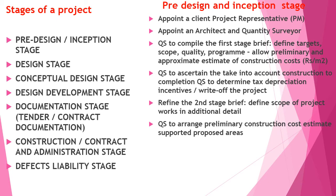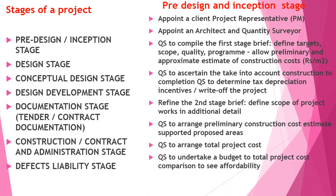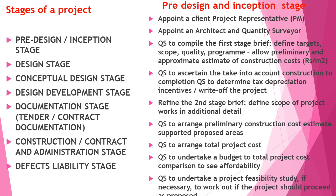The QS has to refine the second stage brief and define the scope of the project work in additional detail. They arrange a preliminary construction cost estimate supported with proposed areas, arrange the total project cost, undertake a budget comparison to assess the affordability of the project, and undertake a project feasibility study if necessary to work out if the project should proceed.